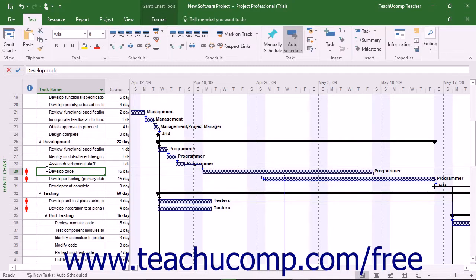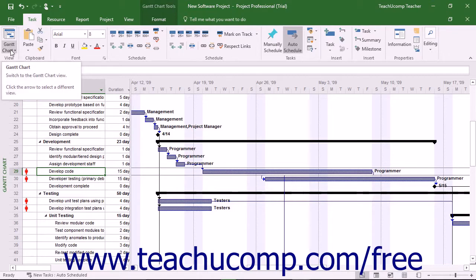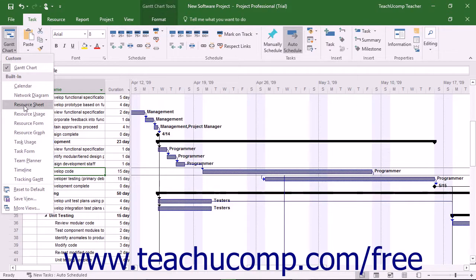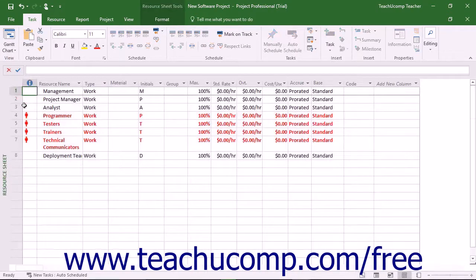To do this, first switch your project file to the Resource Sheet View by clicking the Gantt Chart drop-down button in the View button group on the Task tab in the ribbon, and then selecting the Resource Sheet command from the button's drop-down menu.